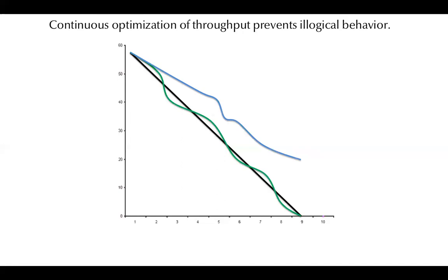For those who don't know Brooks' Law, it comes from a wonderful old book called The Mythical Man Month, which is a classic of project management from the 20th century. And Brooks' Law states that adding resource to a late project makes it later because of the overhead and bringing people up to speed and the communications overhead and all the stuff that we've talked about in the last couple of webinars. So you wind up with not a very pretty picture when you get to this release point in the middle of week 9.